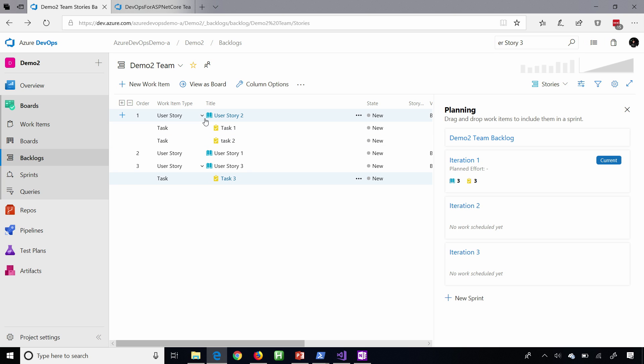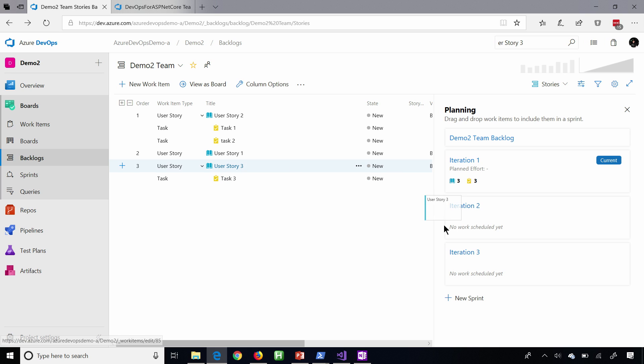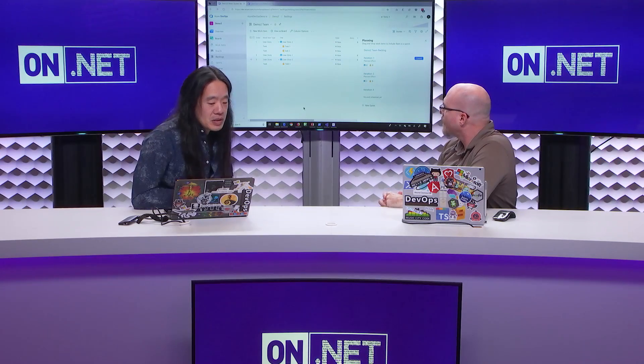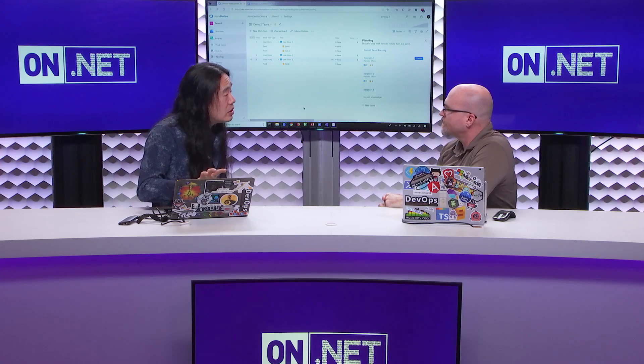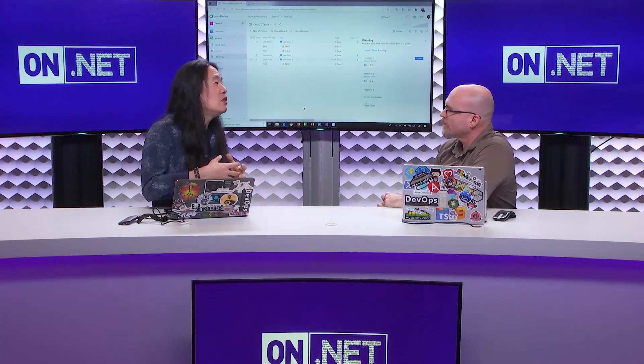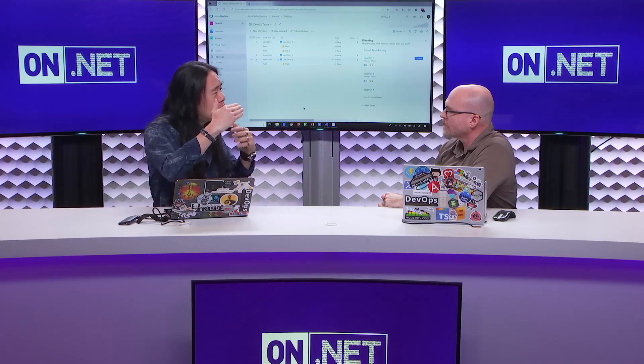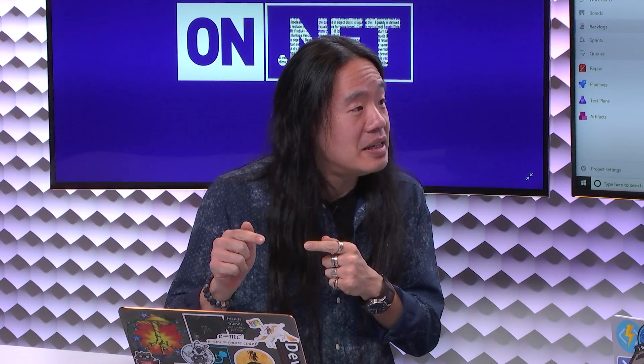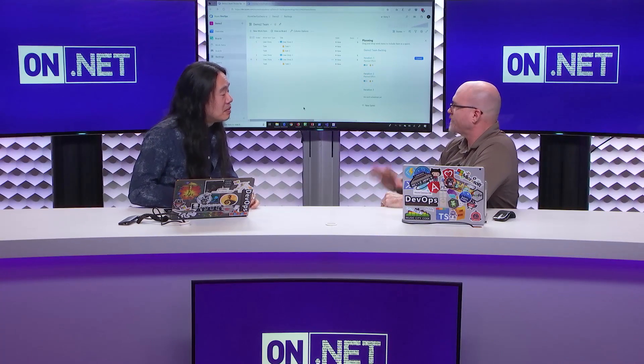And this whole UI is fully drag and droppable. So if I really wanted to, and I wanted to re-parent this, I can drag this and re-parent it just like that as well. Okay. So super easy to manipulate the things that you want to do. So this is great. Then you can start taking your tasks. And notice we have all these different iterations, right? Iteration one, iteration two, iteration three. Right. So these would be like our individual sprints. So if you have a really, really long backlog, you can start dragging your work into your different iterations as well. So we're basically committing to what we're going to do in the first iteration and guessing at what is feasible down the road. Yeah.